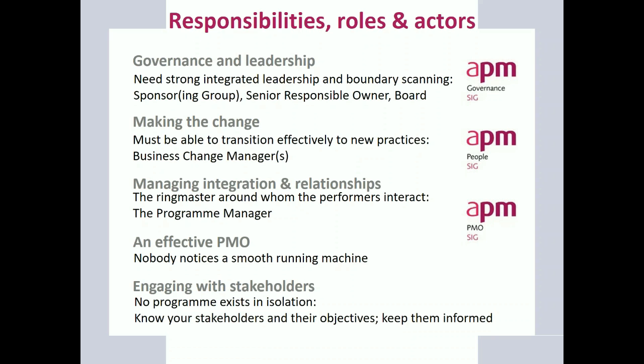The fourth one down is something I haven't introduced yet, the program or project management office. And the key here is precisely in those words. Nobody notices a smooth running machine. Having a PMO working along in the background as the data cruncher, the data recorder, the analysts of what is going on is absolutely a key to success. A small example, if I may, from the Olympics example. Of the 19 different venues, clearly the thing for the Olympic Park was not when the first venue finished, but when the last venue finished.